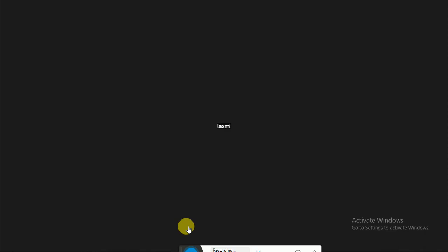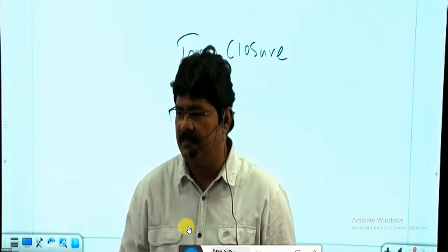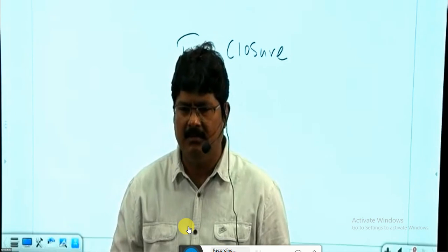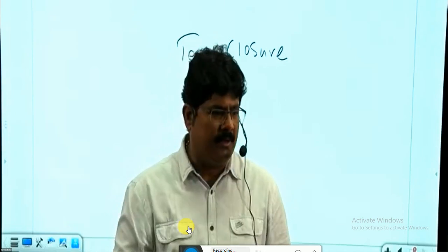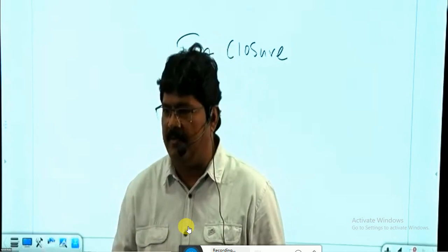We release the product, because these 2 bugs do not have much impact on the usage of the business. One week of time is available next week. Then you ask your development team to release the fixes by next Monday, Tuesday or Wednesday, because next Friday we have a release. Simple.